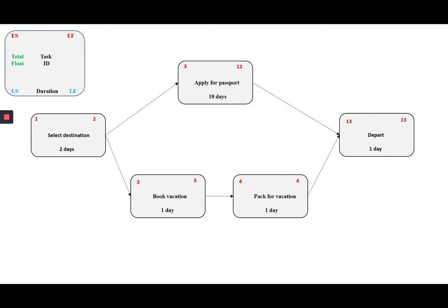And in this case, now what we're going to do is calculate the latest that each activity may start and finish. So in this case, we need to prime it. So again, the late finish is equal to the early finish, again on the assumption we want to do this as quickly as possible. So in this case, the late finish is 13. And that's always the case, you'll start that at 13. Just like the early start starts at 1, the late finish starts at the early finish.